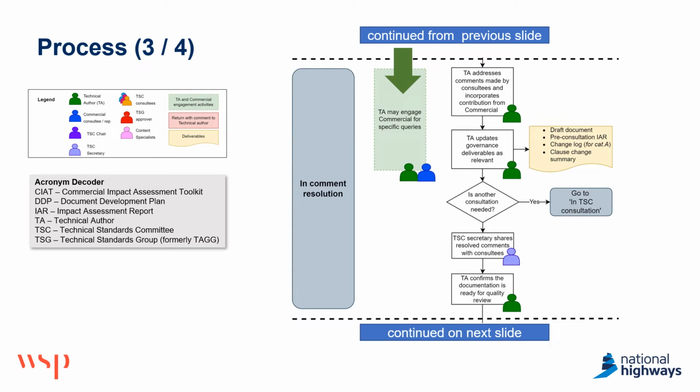After consultation, technical authors will review and address comments received. As I said before, we have now introduced a dedicated stage for this activity so that we can distinguish between the time in consultation and time for comment resolution. That will inform our wider monitoring of governance stages and help us continuously improve how documents are drafted and reviewed.